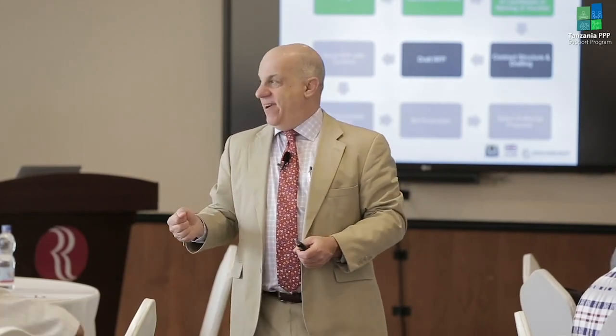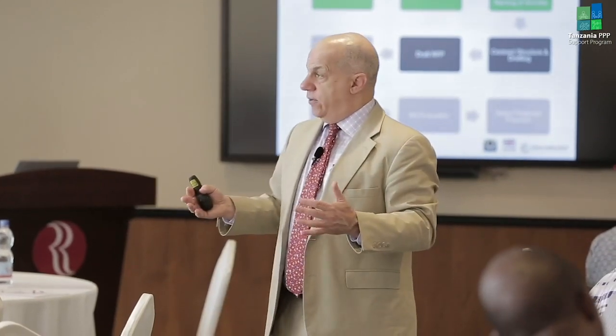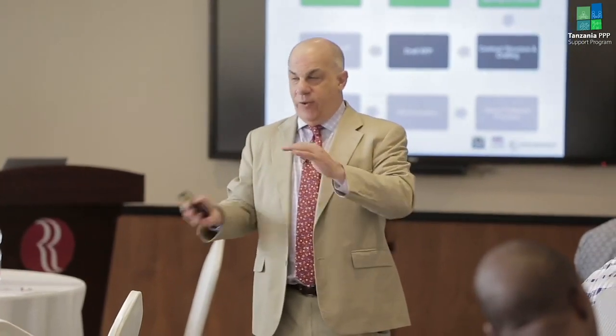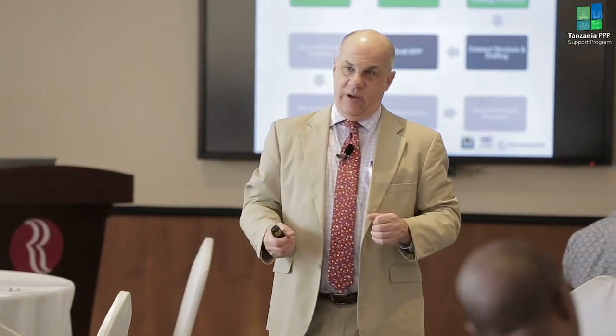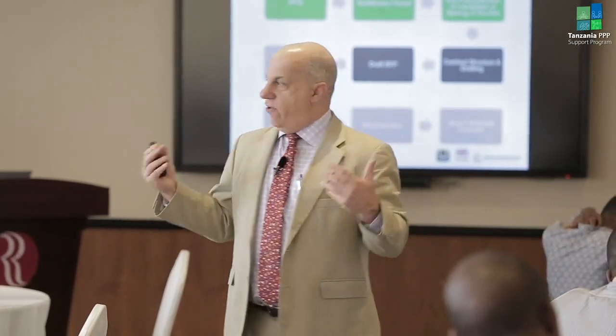Let me ask you, though: do you want to know if there's anything bad in their background? Yes. You want to know, have any governments barred them from procurement? Are they in any kind of litigation? Have they had projects that failed? You want to know the good, you want to know the bad. So, getting back, we have 12 of them. They seem to be generally pretty good firms.